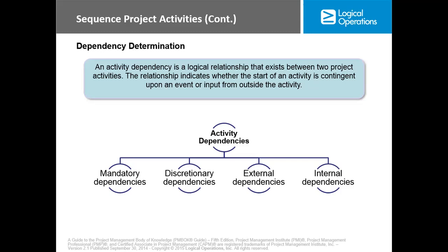Okay. For instance, for you to start laying blocks, the concrete has to dry. Then you can start laying blocks. If you don't do that, it will have problems. So it is not at your discretion, or the nature of how the organization does work, or the custom of that organization. No, but it is as a result of the nature of the job, the nature of the work at hand.